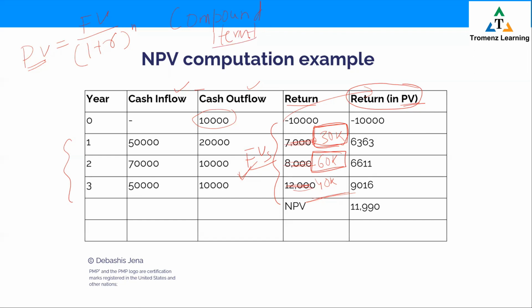Very well. Now using this, you can translate any future earning. Like look at this, 30,000 we are generating 1 year from now. Its present value, using that formula, watch, present value will be equal to future value 30,000 divided by 1 plus R. For simplicity, I'm taking the market rate of interest as 10%. Assume whatever it is, you can take. Okay, say it is 10%.